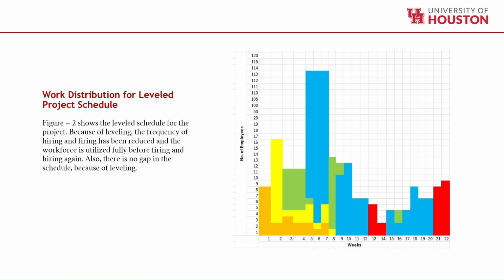One thing that needs to be kept in mind is we can't avoid the critical path. So we can't change the timing of the critical path; you have to keep it constant. You can change the other systems which don't have any major impact. For example, construction of the hull is in the critical path of the system, so that needs to be constructed first before you go through any other things. So we can't change that.